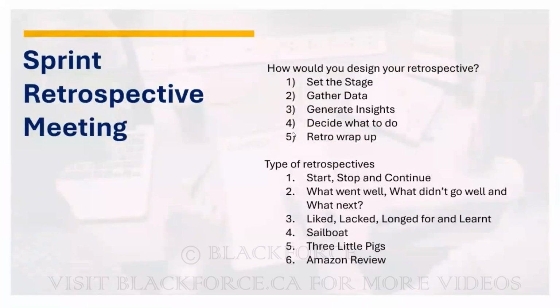So now we'll talk about how to do your retrospective: setting the stage, gather data, generate insight, decide what to do, and you wrap up your retro. And you can use these different methods to gather data. Is it clear? Yes. Okay. Efosa, did you get the answer to the question? Your Scrum team? Yes. Okay.